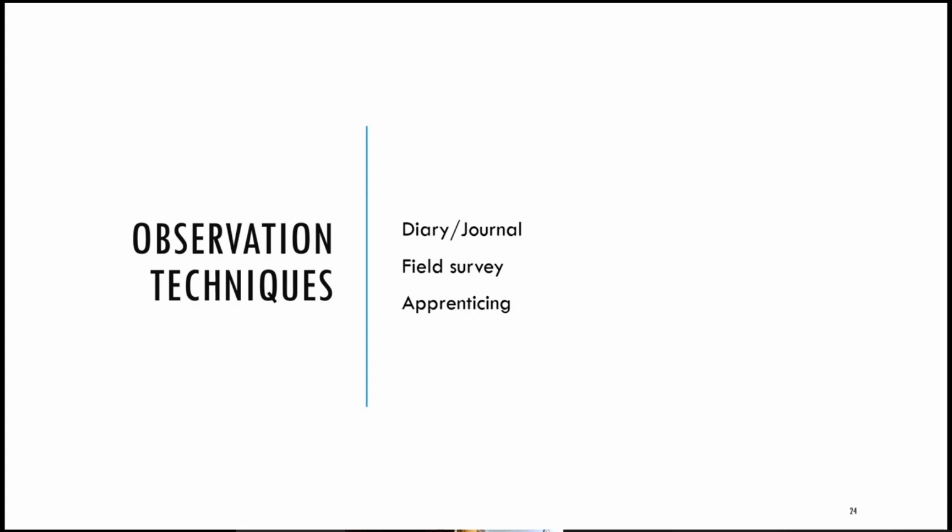But it takes time, and not only your time, but also the time of the users you're learning from. The bigger the project, the further down you should go this list. A small project just needs some notes. But when we're talking about projects that take some years and are worth some millions, apprenticing is the way to go.